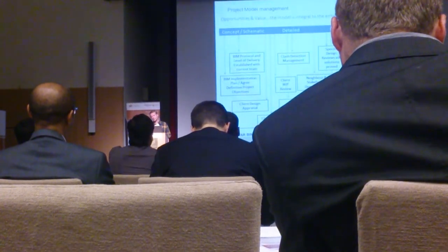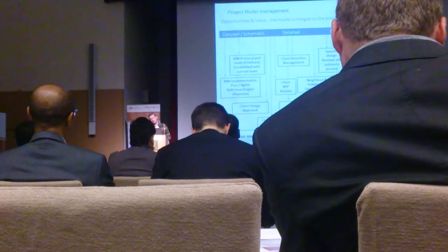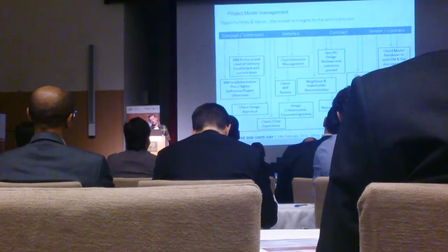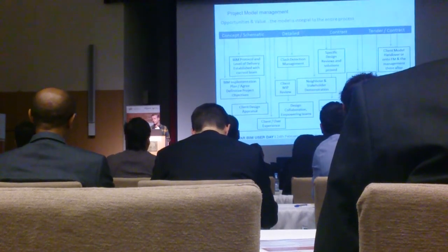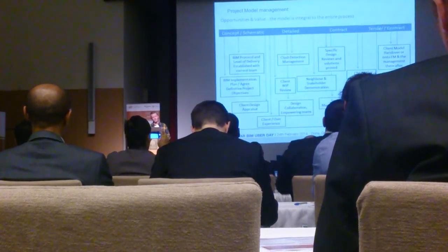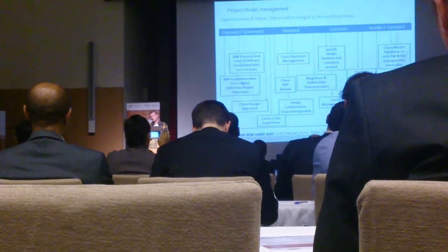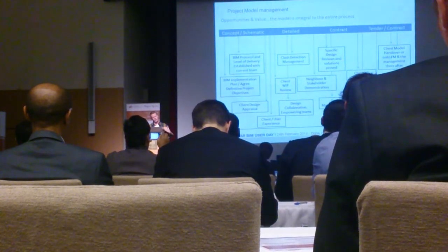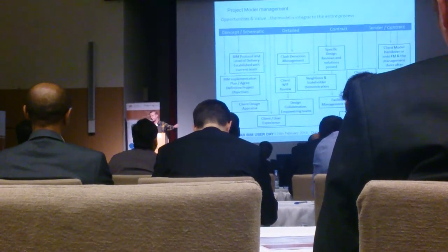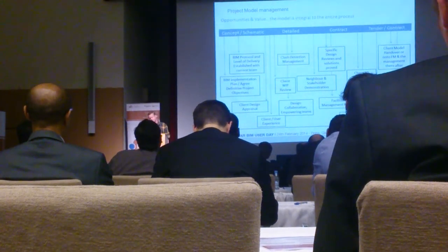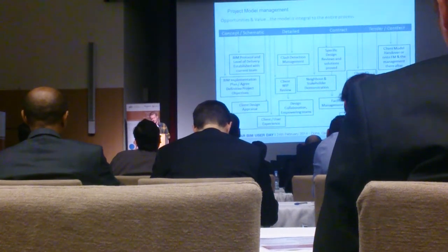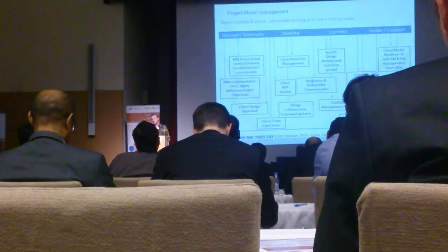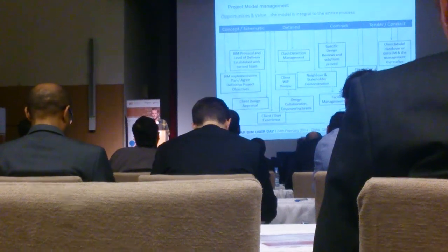Model management is extremely important. If you don't manage the model right, you tend to start working in silos. I've seen a project where working in isolation was lost because people would start up a model and not share models for six weeks, and all they're doing is passing problems down the line, and people end up doing redesign work. It's about your implementation plans — clash detection is extremely important. Set aside dedicated time for design reviews.